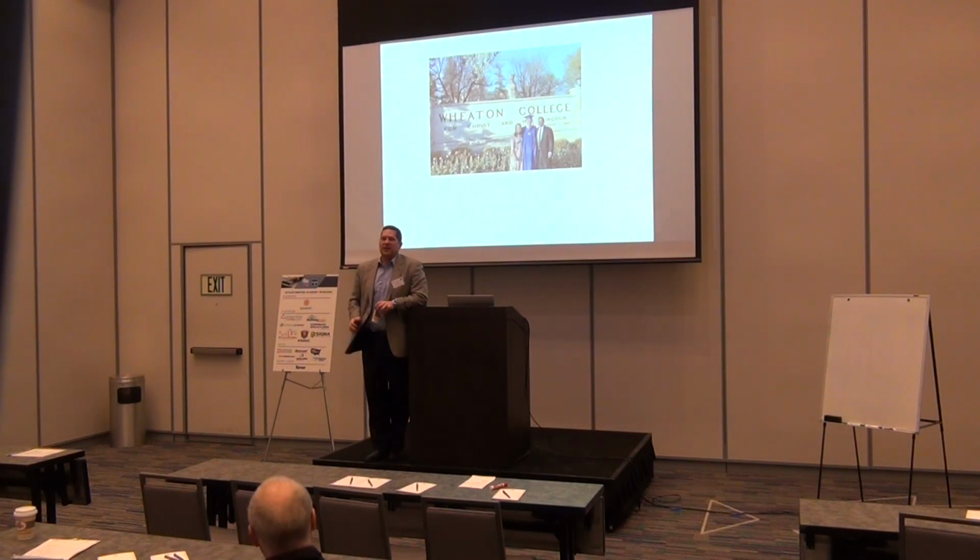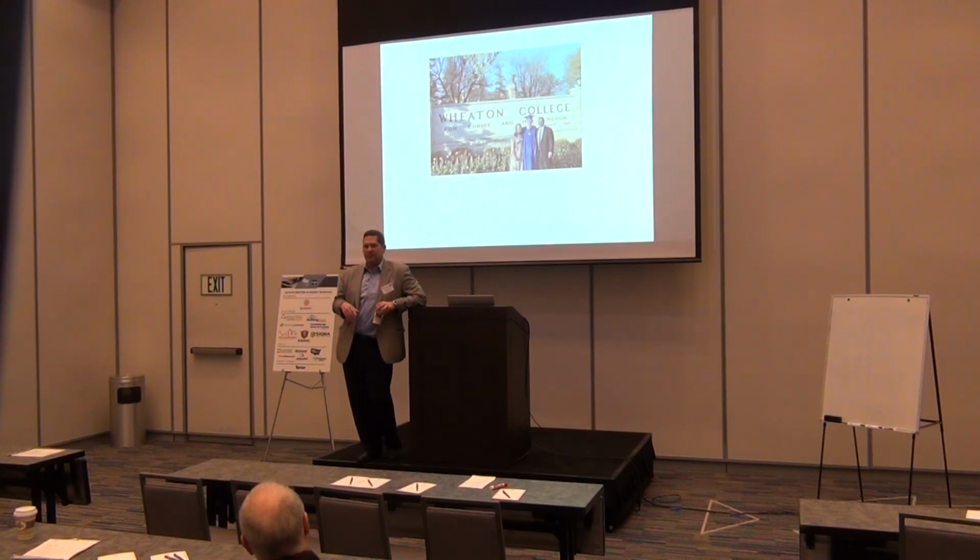Okay, so let me kind of explain how that happens. I just went through that on a project too. So you work on a project, you've got a claim, you finished up your work, or maybe not. And the contractor goes out of business, so a surety, the owner purchased a bond, so the surety comes in and has the obligation to finish the work. And what they will want to do is enter into a separate agreement with you where they agree to pay you directly.